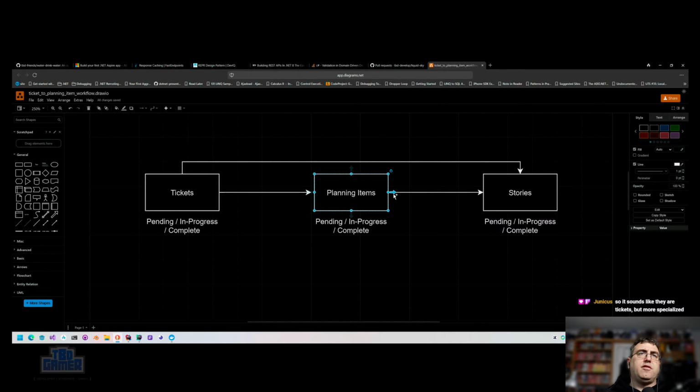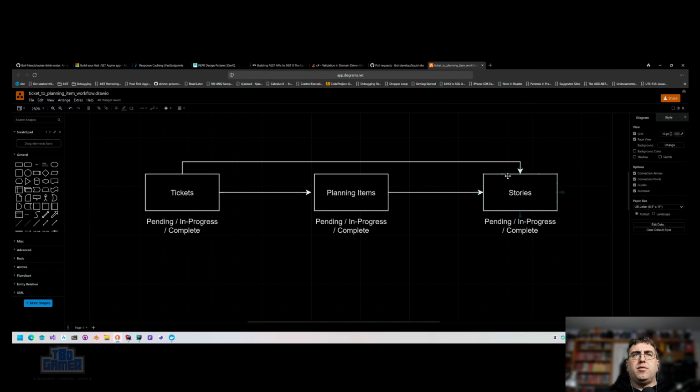The idea of the planning item, by the way, is just purely one of, I see too often what we do is we have kind of statuses in Jira where you can say, okay, this is ready for planning. Now it's ready for dev. And the PM marks is ready for dev, but there's no points on it. They're just marking that. So it looks to everybody else like, oh, it's off their plate. And that bugs me a little bit, because it's kind of frustrating. It's not really helping with visibility. It's not really in a state where it needs to be worked on, it's in a state of they don't believe there's anything for them to do, so it should be ready for dev. But now we can't just pull it into a sprint because it's not actually ready.